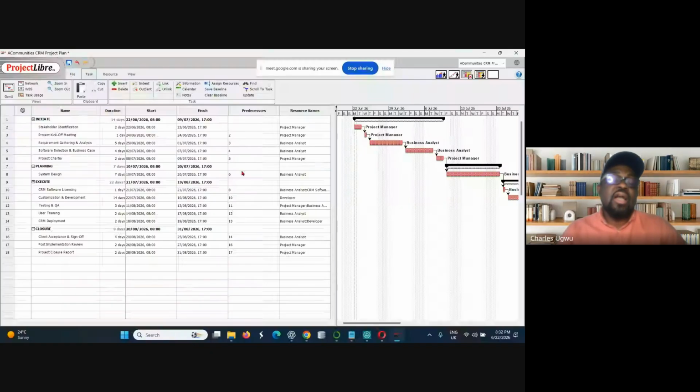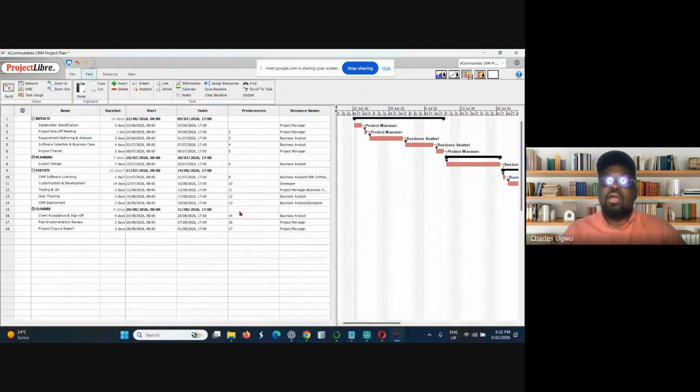This is the first. If you want to change this, you have to come to baseline again. You can come here and add another baseline, baseline 2. After adding any input, it becomes baseline 2. If you want to remove a baseline, you can equally remove it. You can come here and clear the baseline. For the entire project here, baseline 1, clear the baseline. I've put it back to draft and I can continue working. So this is it for you for tonight.